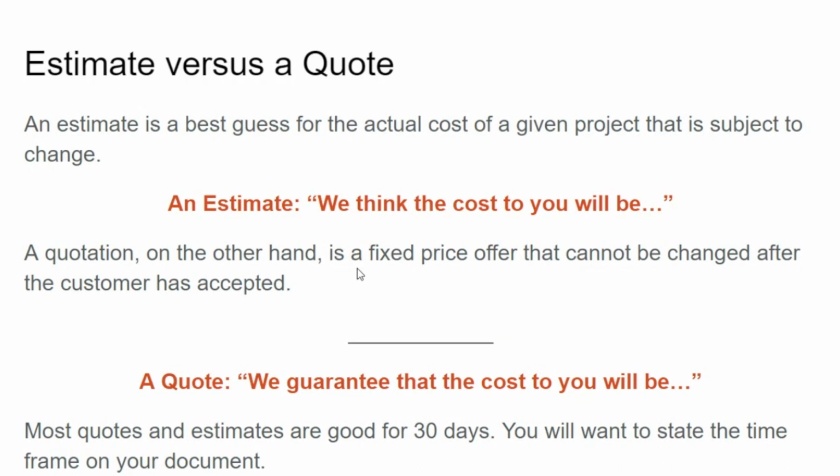Now, if you're in a period of rising prices or high inflation or high interest rates, you're losing money every time that someone comes in and says, okay, give me a quote on that. And then they come back to you in 100 days' time looking for that same product. If you give it to them for the same price, you're actually charging them a lower rate because the time value of money plays into it. Money loses value over time, and it loses a lot of value over time in the case of high interest rates or high inflation, meaning that the dollar can't buy as much today as it could buy last year.